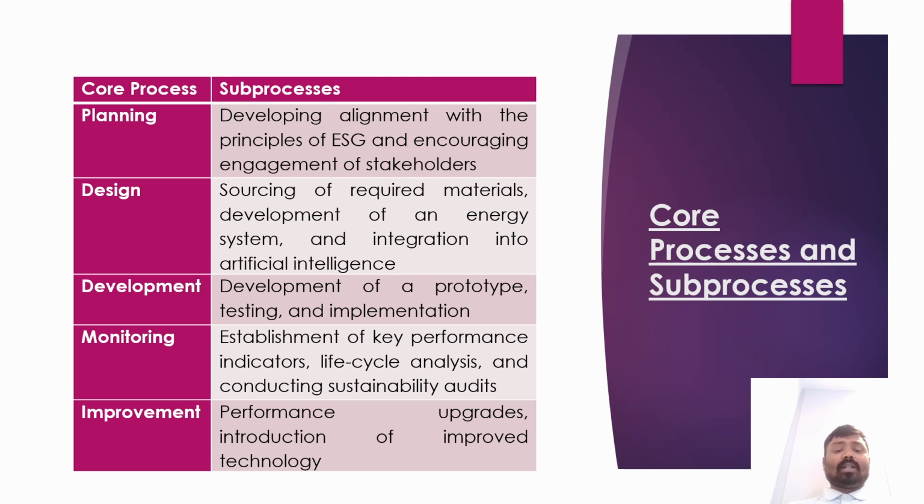Development and commissioning is where theory meets reality. We define 4 sequential activities: site preparation, coordinating with municipal authorities to prepare land and rooftop spaces; pod assembly in modular kits for rapid deployment; functional testing, verifying water circulation loops, sensors, calibration and AI control; and community pilot launch, inviting local growers for hands-on trials.